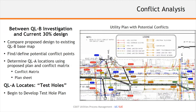While leveraging Quality Level B information and the current 30% design on the utility base map, you'll see the existing utilities called out with the appropriate quality level. When you start looking at the proposed storm drain improvements overlaid, there are a lot of potential conflicts that arise. In red you'll see the electrical conflicts, yellow the gas, blue the water, etc. At this point, we're determining whether there's an opportunity to avoid any of these relocations — for instance, a high-pressure gas line relocation or a major fiber and duct conduit run that leads to an airport or 911 dispatch center.